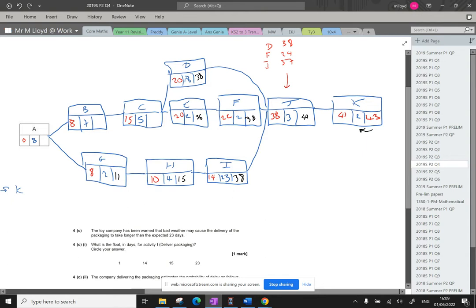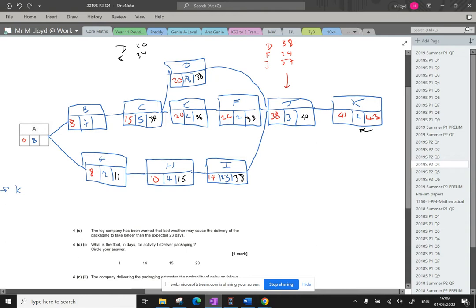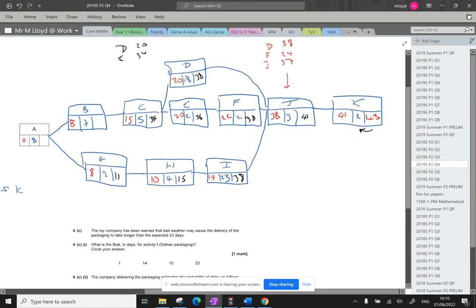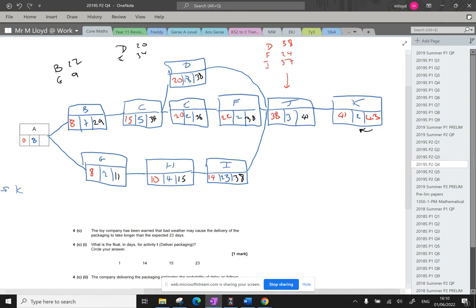And then we've got this problem here, so C. 38 take away 18 from the D route is going to be 20. And then for the E route, 36 take away 2 is 34. So the latest time that this one can finish is after 34, because if it finishes after 34 days, E will take two days, which makes 36. And then we're back on track, so we're not going to overrun on this project. 34 take away 5 gives us 29. And then again, 29 take away 7 for B is going to be 22. 22 for G, 11 take away 2 is 9. So 12 is going to be that latest time that we can run on, I think.